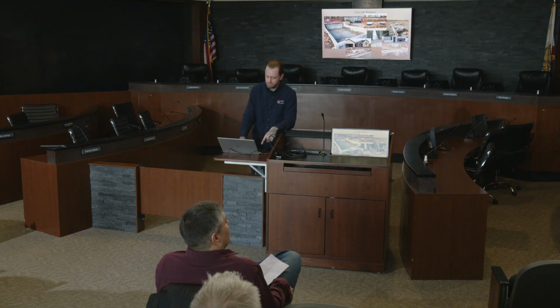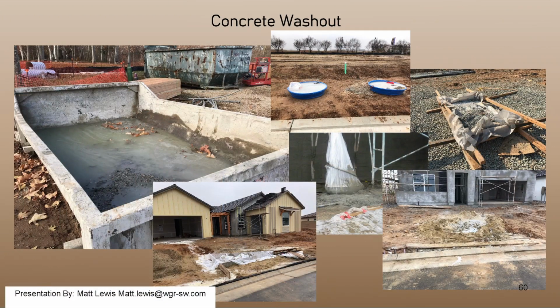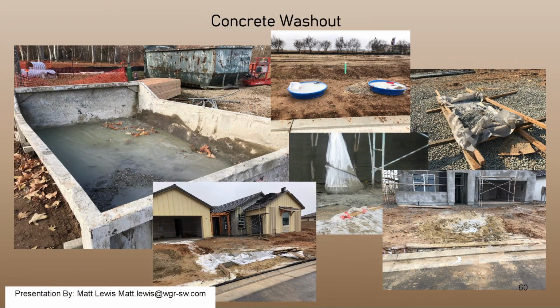Okay, concrete washouts, again, which are usually just an absolute disaster. The big bins are the best because a company comes in, drops them off, they fill them up with concrete washout, and they usually harden to a degree, and then the company comes and picks them up and removes them. Because this is why contractors don't like to deal with them, like for instance, the kiddie pool. Usually what happens is they'll buy a kiddie pool, and then they'll buy another kiddie pool, and then before you know it, you got a dozen kiddie pools filled with rock hard concrete, and no one wants to get rid of them, right? Number one, it's a big pain in the butt. You got to get an excavator or something to pick them up because they weigh a ton.